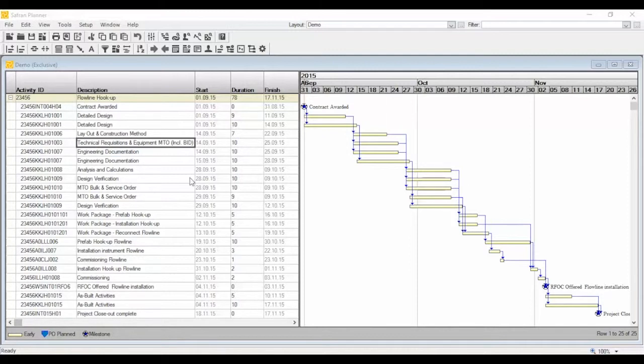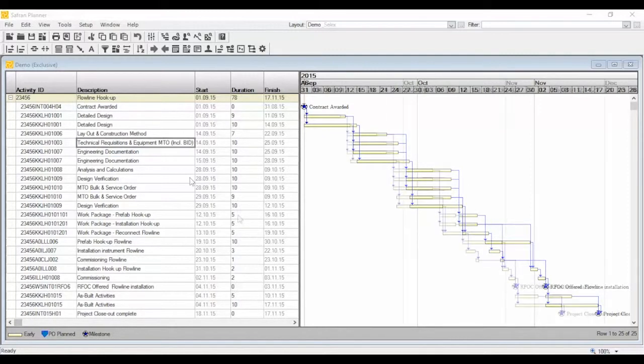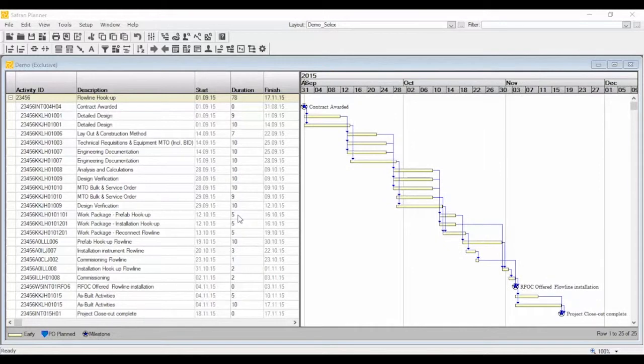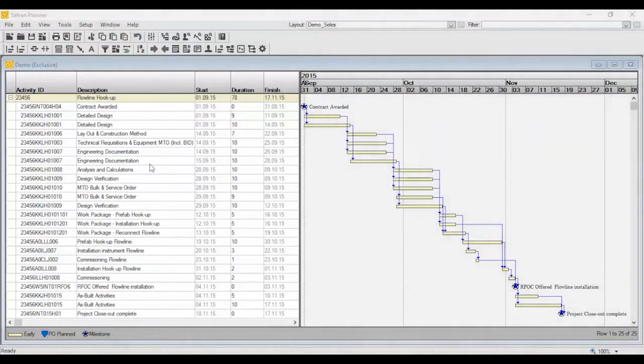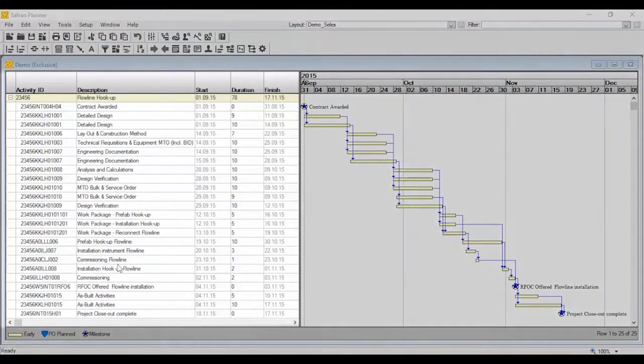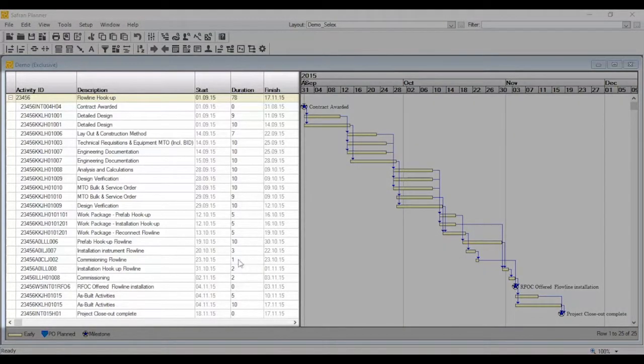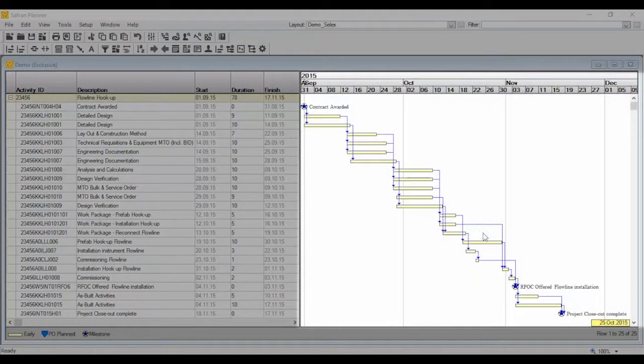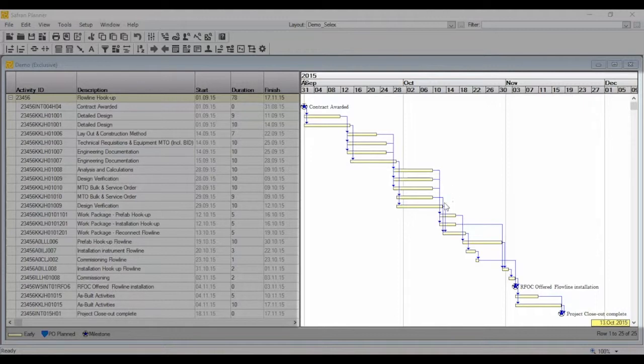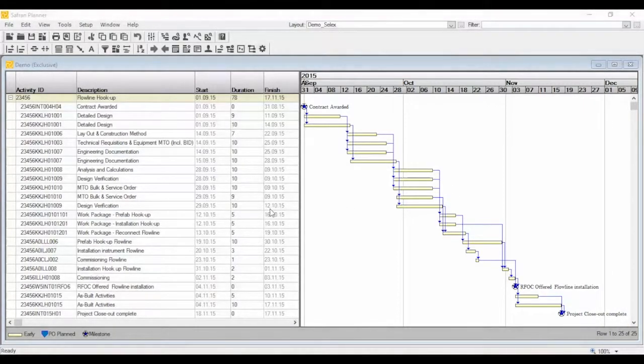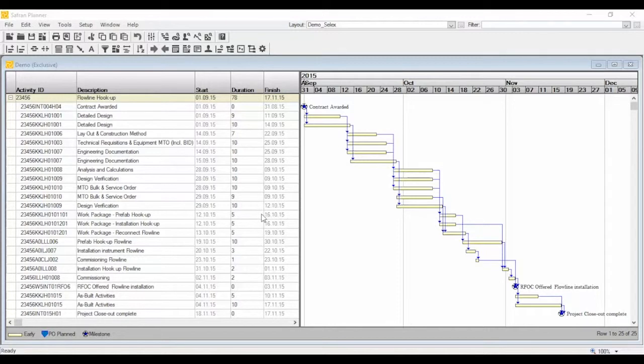The bar chart editor combines a spreadsheet-like column area with an interactive Gantt area. Saffron Planner lets you add, insert, and delete activities in the column area or draw new activities in the graphical bar area.